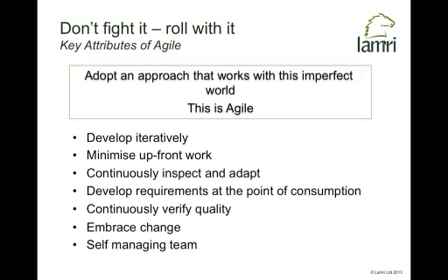We'll develop requirements at the point of consumption. In other words, we'll recognize that people find it immensely hard to get locked off in a room for 1 week, 2 weeks, 6 weeks, and be expected to write a mammoth requirement specification. Instead, at the point we're going to develop a requirement, that's where we'll engage with our users and say, okay, now what do we actually mean? Given the context of what we've developed to date and our ongoing journey of understanding what a solution looks like, what are the requirements? What's the requirement here?